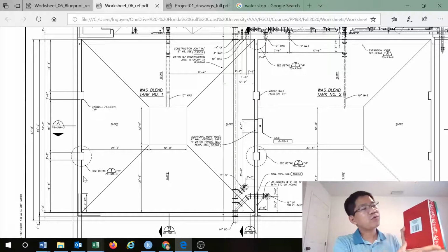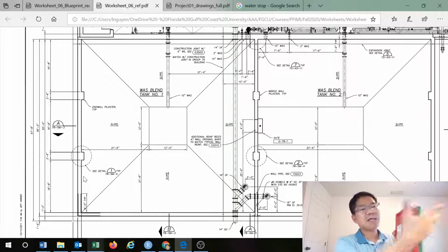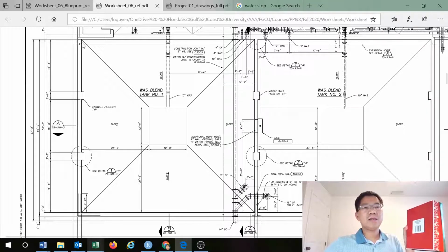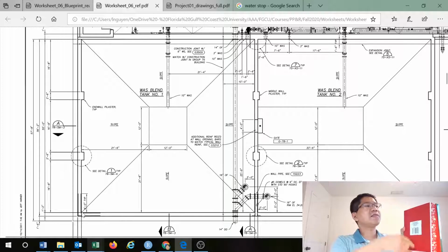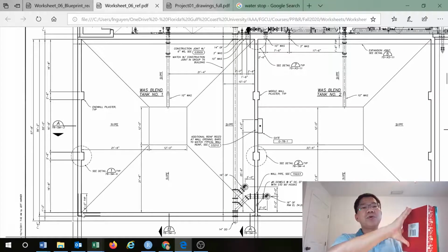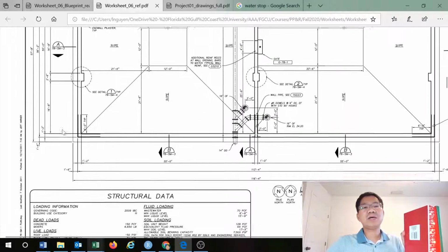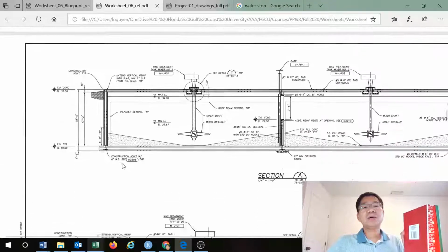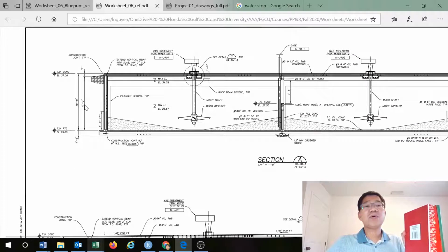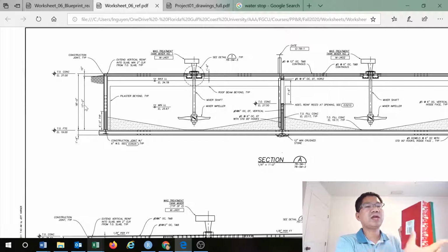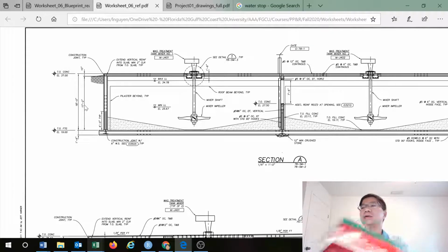To determine square foot contact areas, one side and then times 2. So you see the one side in here, and the other side, the height of the wall. For the height of the wall, you need to see the cross section of that. So here it goes down to this elevation and the height of the wall in there. So you know this and the height. It's not about the thickness. Okay, so the same process we will apply for other walls.